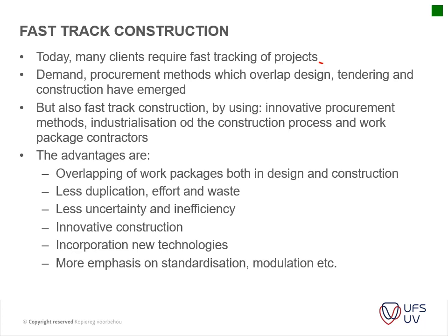Okay, so you have a procurement method which overlaps design, tendering, and construction; they have to be merged. The main thing is, while you're designing, you're already looking at procurement of certain sections.